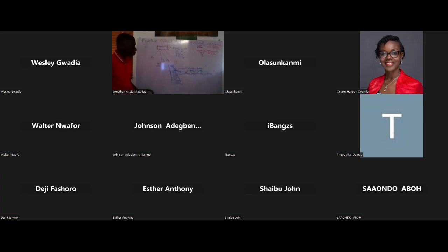After that, what are you doing? You roll up the cost of each of these work packages. This cost plus this cost plus this cost plus this cost plus this cost plus this cost. You may now say my foundation is therefore 48 million naira. That's how you arrive at the cost. Then you do the same thing for what?